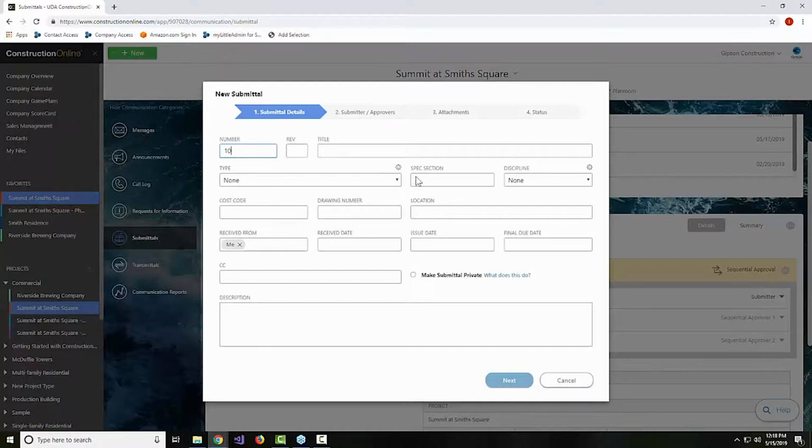The spec section in this case is very important because when you get a detailed spec sheet, there are going to be areas in there where we're looking for a specific model commode or something similar. Maybe for the sinks, maybe we're using American Standard for all of the bathroom sinks and toilets and everything. If they, for whatever reason, are backlogged and we can't get those, then we might have to choose a different option. So again, it's really important that we go to the spec section and refer people here as well.